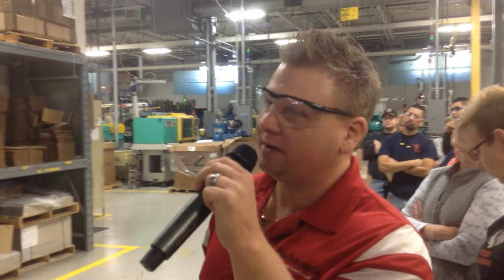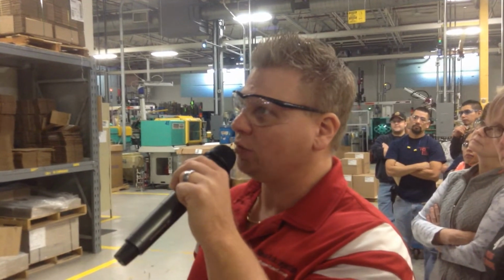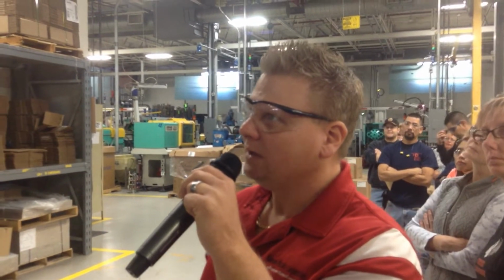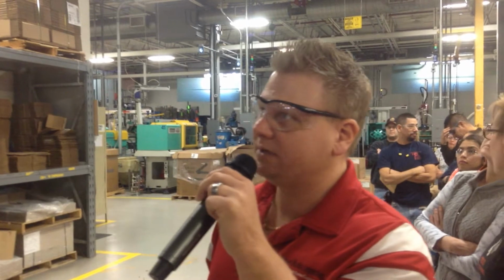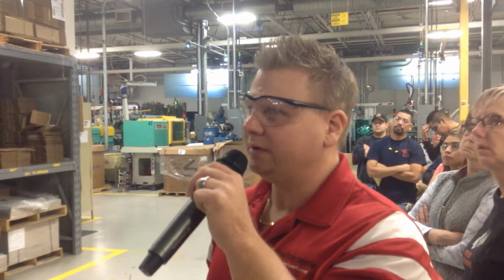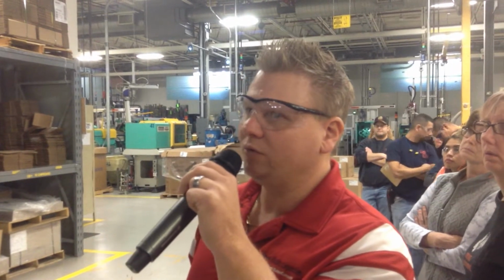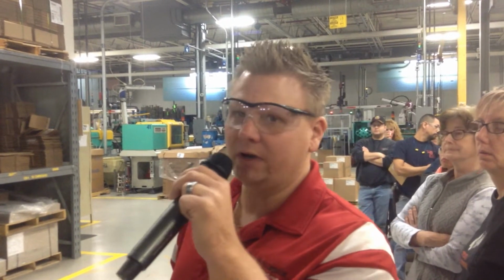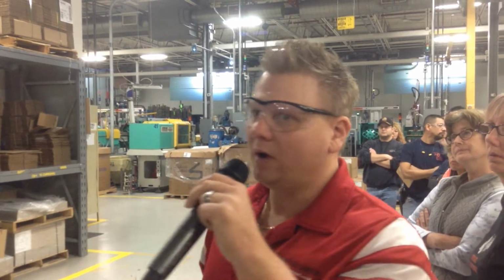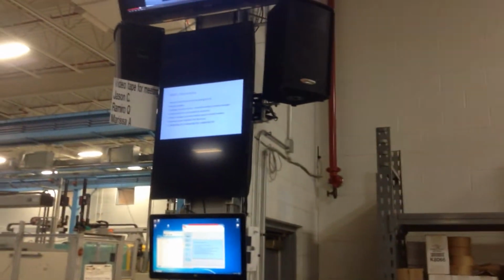Office build-outs are on schedule to be done first part of February of 2016. The main electrical service to the building is hopefully going to be done by ComEd by the first part of the year. In conjunction with all that, warehouse lighting will be put in and the HVAC will all be done at the same time. So I wanted to give a brief overview about how this process is working.